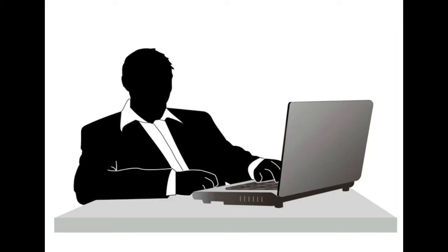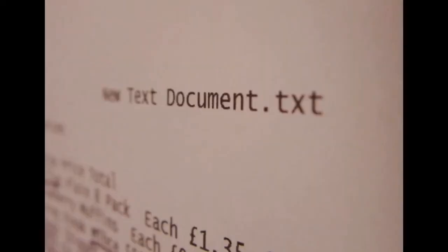You want to introduce your client to deliverables early on. Set them out in the brief, give each one a timescale, and use them as the end of each creative stage. So, for example, your first deliverable could be just your brief, but your second could be the research and mood boarding you carry out, while the third could be a round of mock designs, and so on and so on.